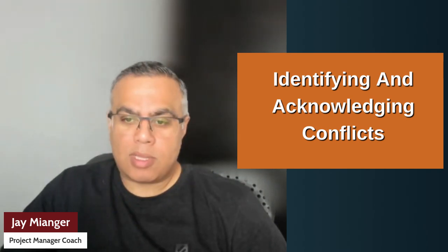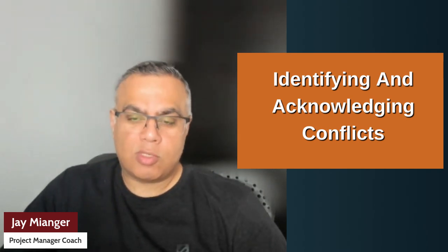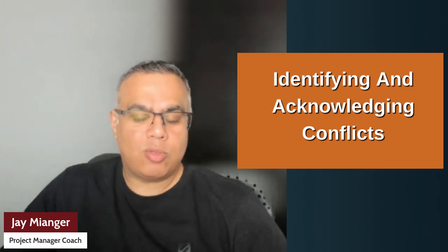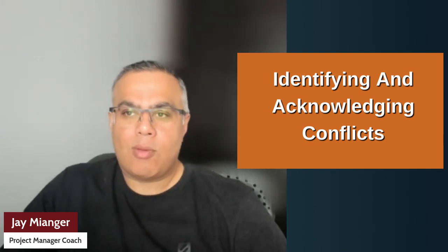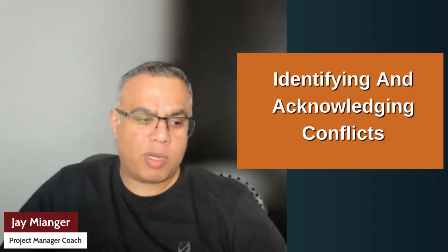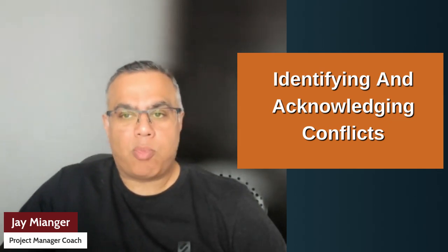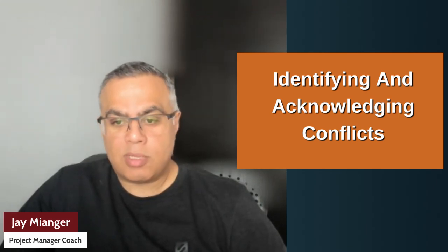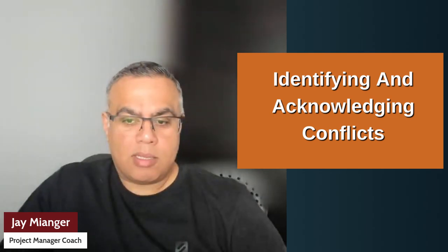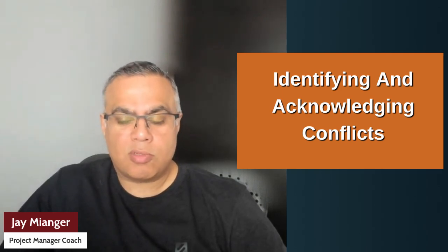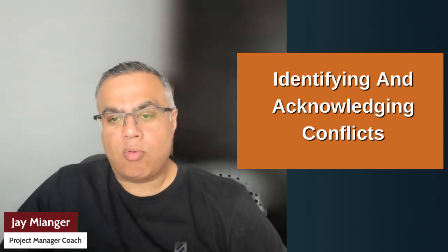And one of the things you've got to try and do is resolve the conflict once you've identified and acknowledged it. One of the things you must not do is ignore the conflict. Like with any conflict in life, if you ignore it, over a period of time it festers, and as it festers, the problem becomes a lot bigger if not dealt with early. So once you've identified it, you need to clarify what the issue is, bring parties together, identify a solution, and then continue to monitor and follow up. But we'll cover that as we go through some of the areas.